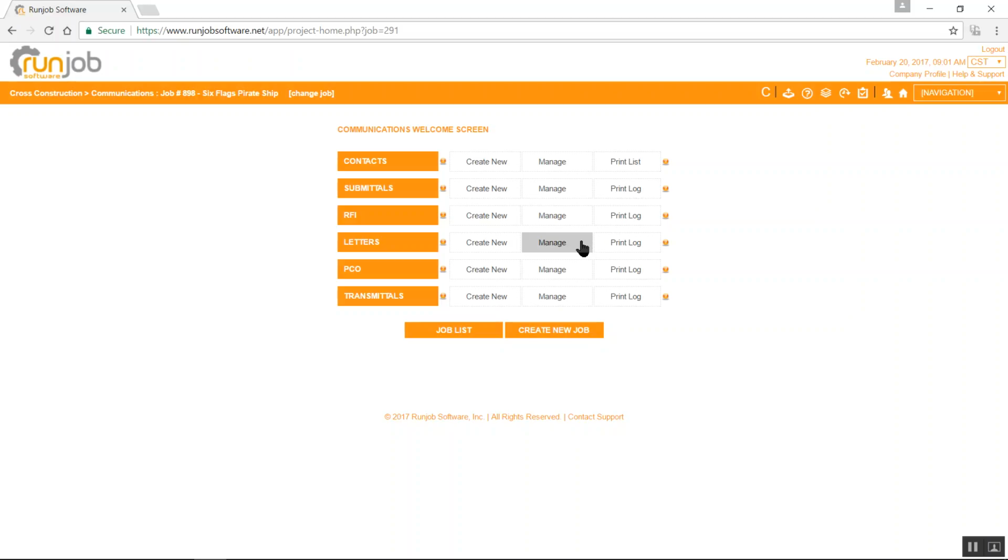Letters. You can create letters from yourself to different parties, and as you label all of your parties, i.e. your rebar supplier or your painter, as you give yourself and all of these contacts designations with an acronym. Say you're working with a company called Johnson Rebar. You can name them JR for Johnson Rebar and then generate a letter from yourself to Johnson Rebar. It will create a number, which is not only one number which is sequential, and another number which goes with the designation of your acronym for your company / their acronym for their company, and then the sequential number.